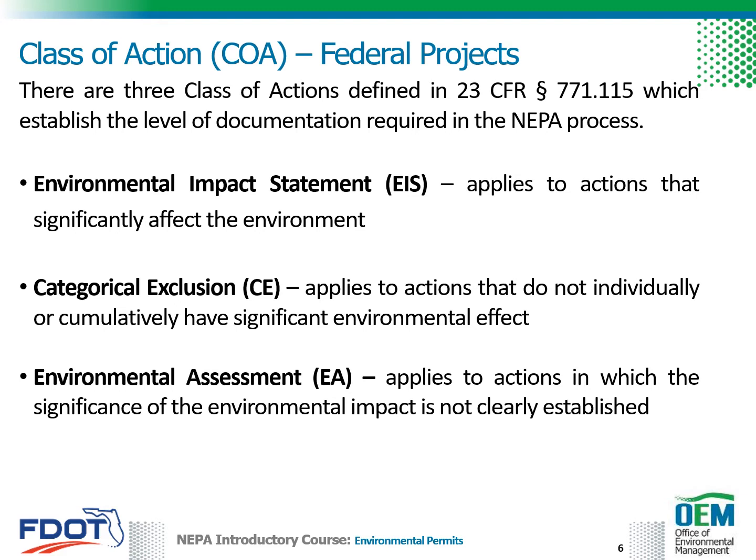The last is an Environmental Assessment, or EA. This class of action is assigned to actions in which the significance of environmental impact is not clearly established. More information on class of actions can be found in Part 1, Chapter 2 of the PD&E Manual and the computer-based NEPA introductory course, Class of Action.